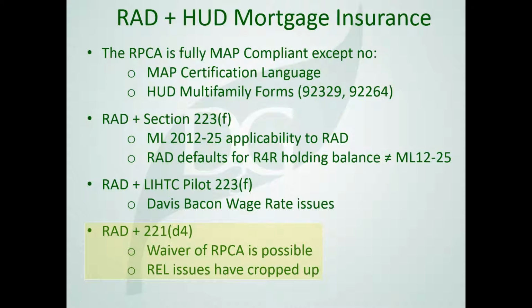One interesting note on the waiver of the RPCA is beware. We're involved in many projects where the RPCA could be waived or was waived and maybe shouldn't have been waived, or we're glad it was not waived. A good example is when you're in a project and the scope of work starts being value engineered. Things come into the scope of work, things go out of the scope of work. Things change in the scope of work. All those dynamic changes could technically affect the reserve for replacement deposits.